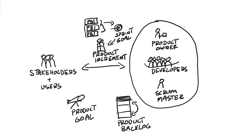The team verifies that the next items in the product backlog are still the most important items to work on, or whether they should pivot and work on something else instead. Based on this feedback, the product owner adjusts and adapts the product backlog accordingly to meet any new opportunities or requirements identified, ensuring that the Scrum team is always working on the most valuable items.